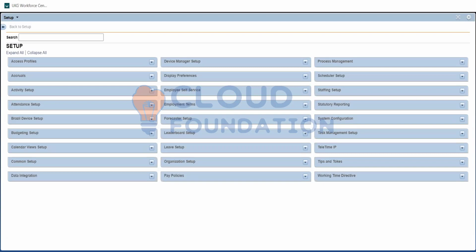So if you have around 50,000 employees and a basic setup to be created, you can have 5 to 6 resources for the initial implementation from your end, and Kronos will give you a dedicated team based on the workload, and you need to interact with them. Our work for the initial implementation would be testing the features they are providing us, whether they are working as expected.